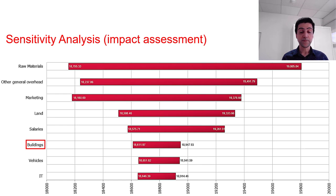When we alter the raw material cost within its range, the output, which is the total cost, will vary between $18,155 to $19,805. So we can see it's a quite large range when compared to other input variables such as buildings, which has a very low impact on the output.